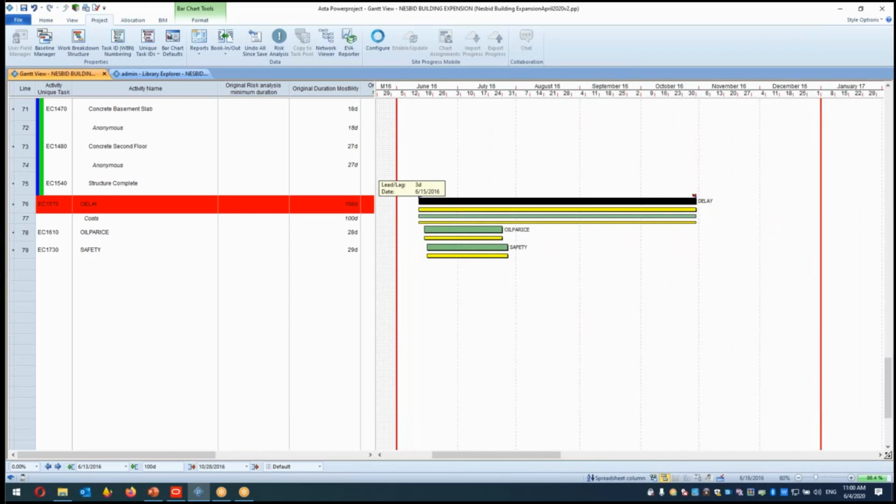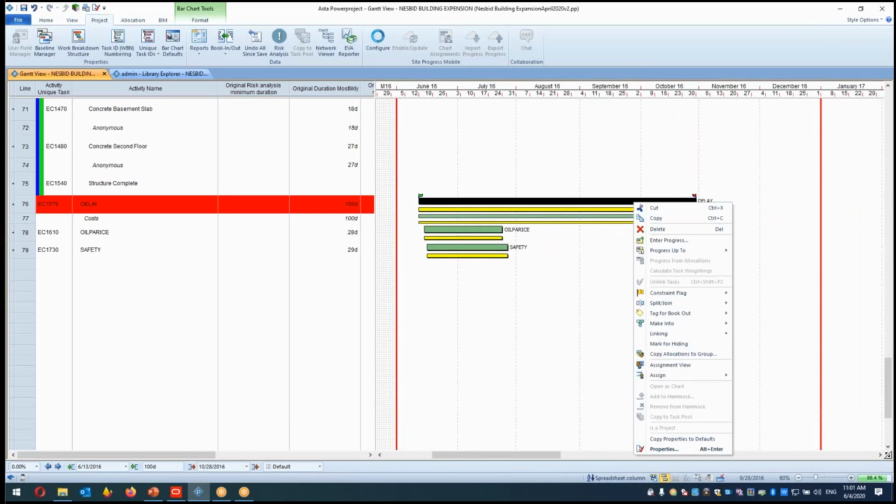That constraint will keep the task from moving outside the dates you give, so it does not happen earlier, does not happen after, and happens just in the middle, or that kind of thing. You can apply constraints such as start on and after, or deadline. These are the constraint types you can apply.